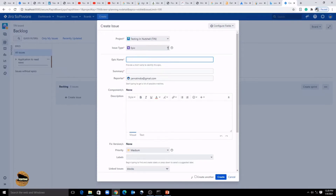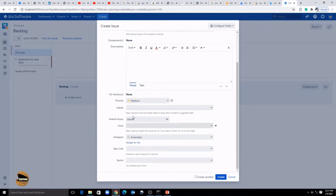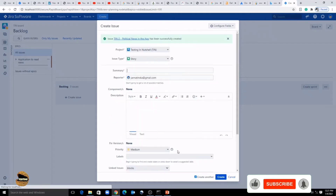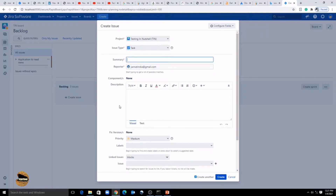That's the reason when you click 'Create Issues' in the backlog you don't see an epic option — epics are not part of your backlog; they are project requirements broken down into user stories and so on. Let's create a user story this time. Select it as a 'User Story' from the dropdown — for example, 'Political news in the app.' This will be a section where news related to politics will be organized. You can associate a sprint if you already have one, but right now we do not.